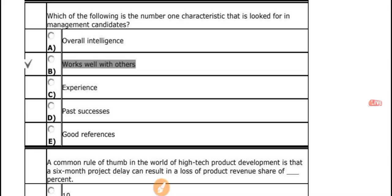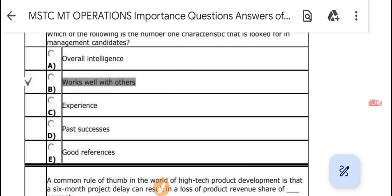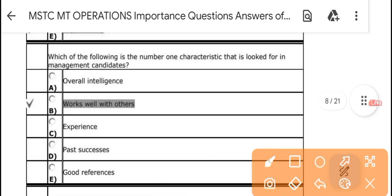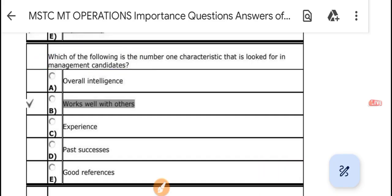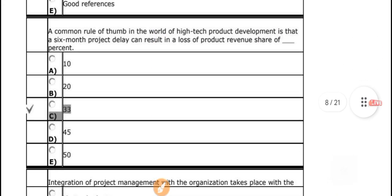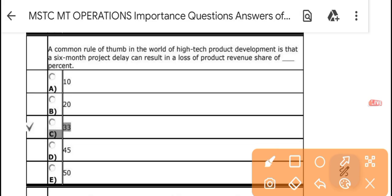Which of the following is a number of characteristics looked for in a management candidate? The answer is 'works well with others' — this is a key characteristic to look for in a management candidate. A common rule of thumb in the world of high-tech product deployment: a six-month project delay can result in a loss of 33 percent of product revenue share.